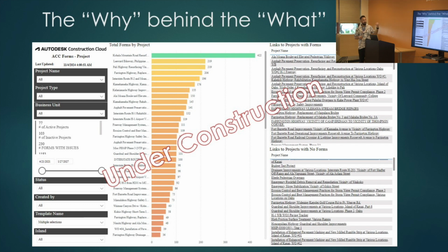And again, you could also filter this to show where BMP deficiencies aren't quite being closed out properly. So you would be able to see, oh, we have all these open deficiencies that have been open for X amount of time, and it could enable REs to say, well, why aren't we issuing liquidated damages, or at least provide some kind of reason for why these BMP deficiencies are remaining open.